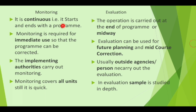What is the difference between monitoring and evaluation? Monitoring is continuous — it starts and ends with the program. If a watershed development program is for 5 years, we have to perform monitoring for 5 years. While evaluation is carried out generally at the end of the program or midway — for a 5-year project, evaluation can be performed after 2.5 years and after completion of 5 years.